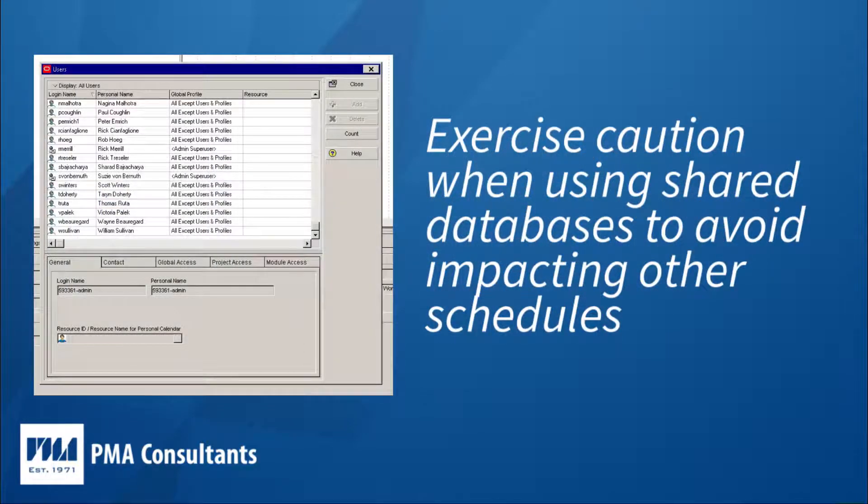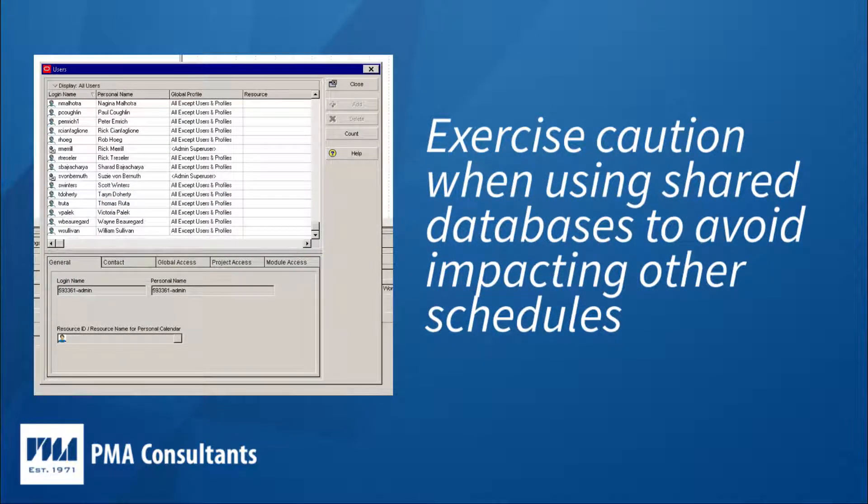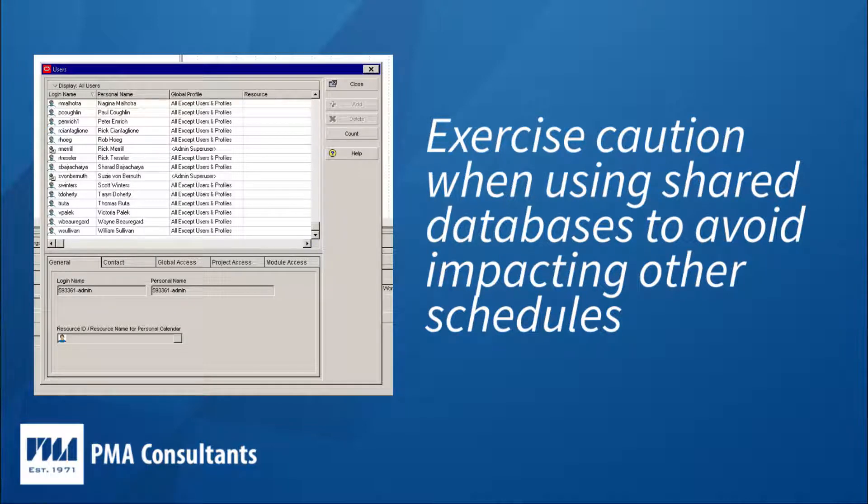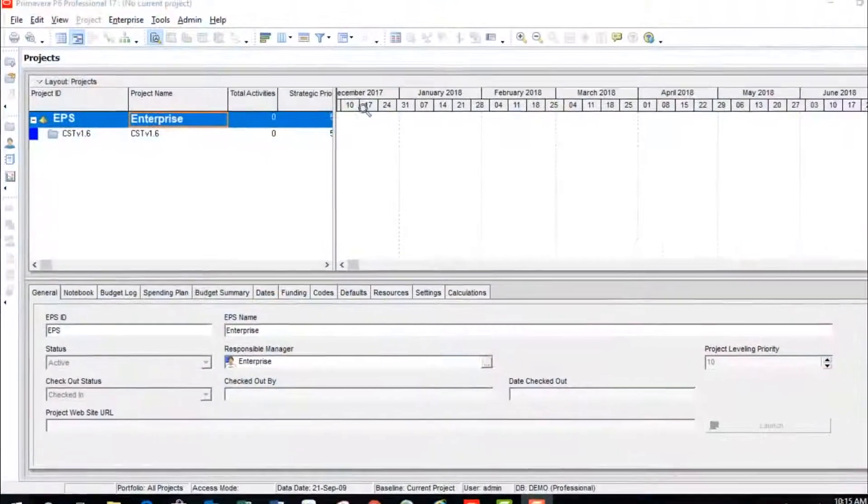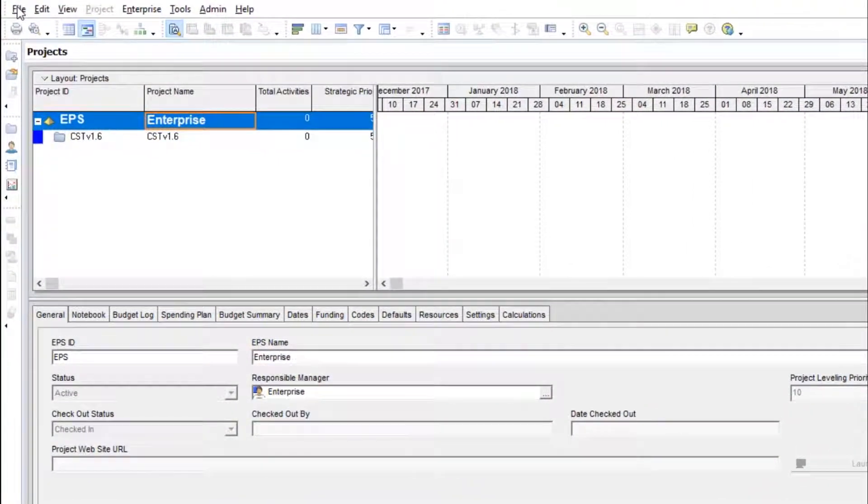If you are working in a shared database with other users, this can drastically and unintentionally impact project schedules that you have nothing to do with. Let's walk through the import process and I'll show you an example of a problem that can arise if you're using global calendars.